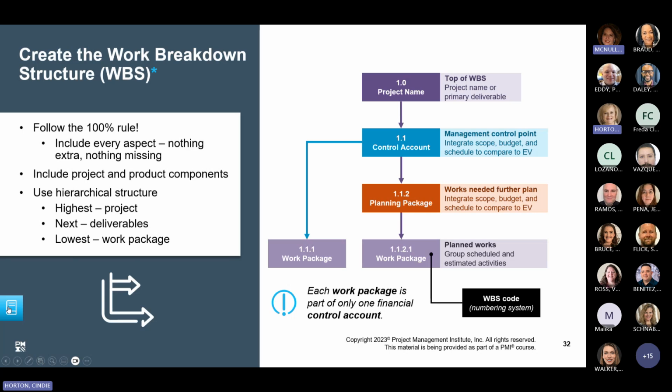This is the key level of the work breakdown structure where the project manager includes the schedule, cost, resources, risk, etc. Information being combined into the work package, which is the smallest chunk from the WBS and which includes the to-do activities so you can ascribe duration and estimated cost. I promise you all this is going to come forward. You're going to hear all this again. It is the key component that project managers must concentrate on when planning and managing the work. So that's kind of important.